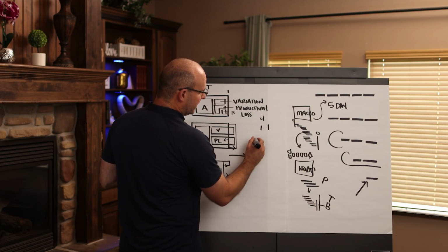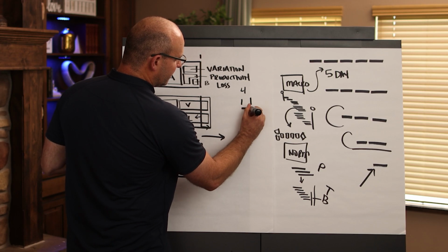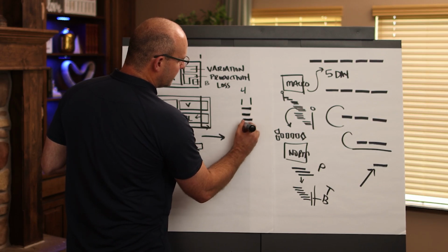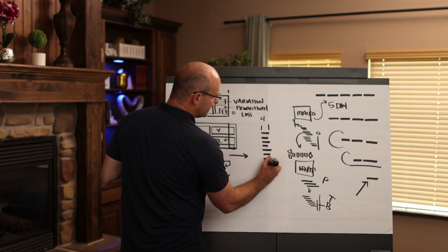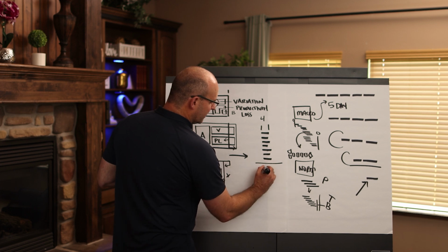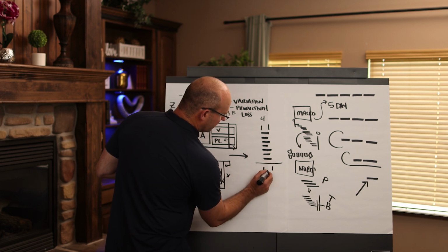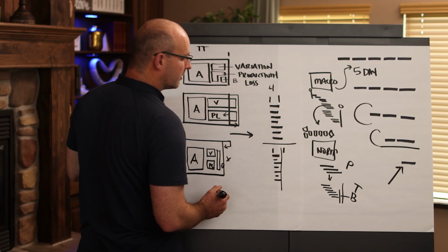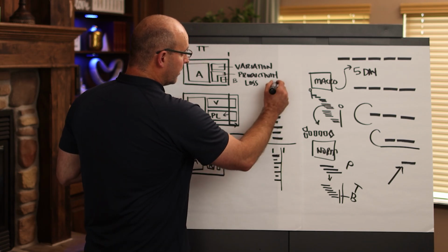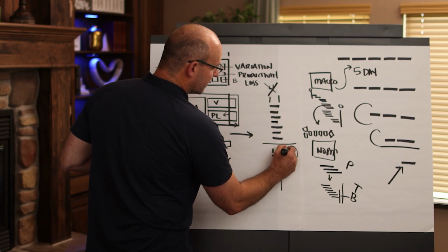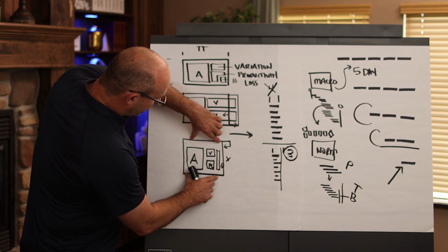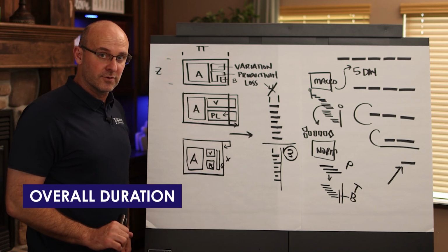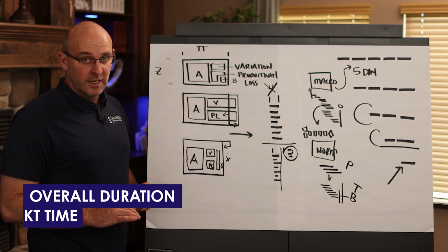Let's say that you're on a job site with a phase and you're on a 4-day takt time. And let's say your trades, when you first packaged them, were pretty decently within that 4-day takt time. But then after a couple of months, let's take that same 4-day takt time, your first trade reports that they're going faster. Then your second going faster. Then you might say, hey, we're really getting close to a 3-day takt time. We might want to go from a 4 to a 3-day takt time simply based on all of our contractors being able to narrow their overall duration and then being able to narrow their takt time.